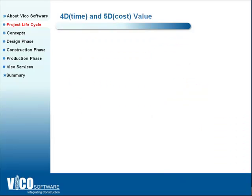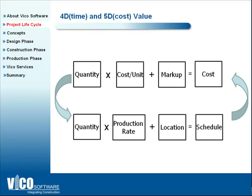The concept behind 5D BIM is very simple. You can see these two simple equations representing how an estimate and a schedule are created. Cost is typically broken down by quantity, unit costs, and subcontractor or general contractor markup — that becomes your estimate. A schedule is broken down by quantity, production rate, the amount of material you have to install, the crew size available to install it, and the location where they need to install it. Most general contractors typically look at the cost and schedule side and leave the detailed work to the subcontractor to figure out the actual cost and schedule accuracy.